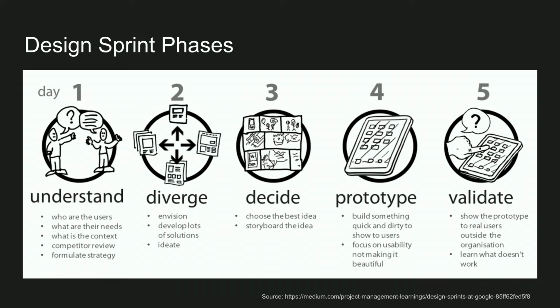Now the shift is a little more heavy on the engineering side. They are the ones who are actually on the computer, creating prototypes. Or if the prototype is just a series of mock-ups that are linked together, maybe it's the designer who's creating the design, but everybody is looking over the shoulder and participating and trying to provide meaningful information about how to evolve that prototype. And then you go into validation, and in the validation, you want to have actual users. So if you want to do this in the 5 days, you need to schedule those interviews with the users ahead, right? You have to say Friday, that's where we're going to steal an hour from your time, and we're going to show you some prototypes, and we're going to collect your feedback, right? So it requires a lot of planning.